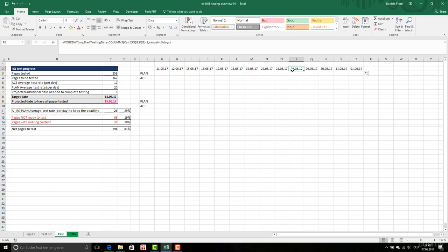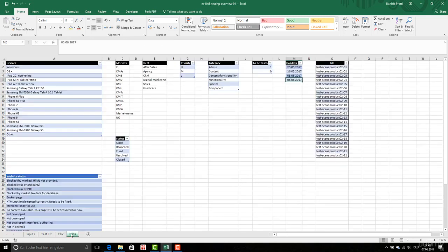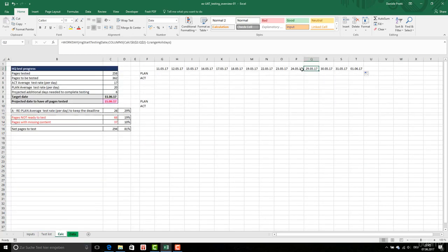Here, for example, look, May 24, we jump to the 29th, because in holidays, the 25th and 26th are public holidays. So 24, but 25, 26 are public holidays. 27, 28 are the weekend, so it's jumped. Okay, and then I can continue.